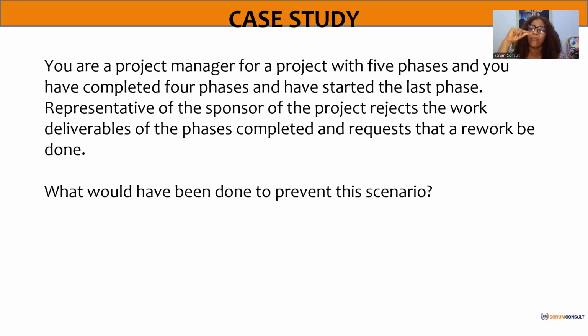But the most reliable is the bottom-up estimation, and for that you need the foundation. Your work breakdown structure becomes your foundation for determining your cost, and for knowing the activities you need for that project. Without the work breakdown structure, you are just assuming. Your assumption might not be reliable.